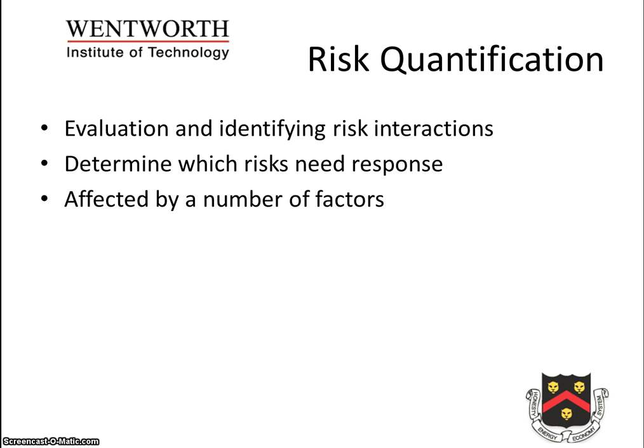They include the first, threats and opportunities that can interact in unforeseen ways, such as regular delays that could cause consideration of a new strategy, thereby reducing the total project duration. A second is that a single risk could trigger multiple effects, such as a late delivery of a vital part of the project, which could result in a penalty, such as fines and payments, overrun costs, delay in scheduling, and often a poor quality product. The third is that reduced costs may favor a stakeholder at the expense of another, so the opportunity for one is the loss for the other. And the fourth is that mathematical principles used may create a false impression and negatively affect reliability and precision.